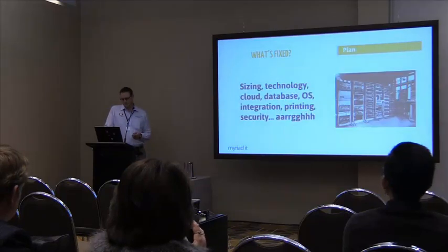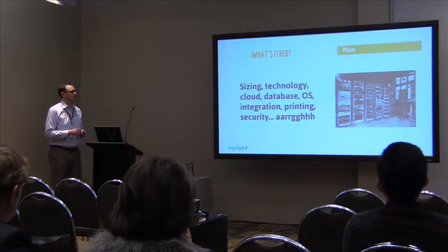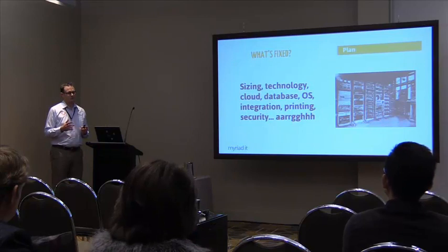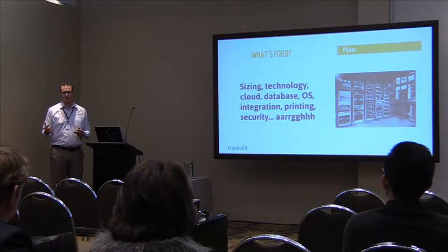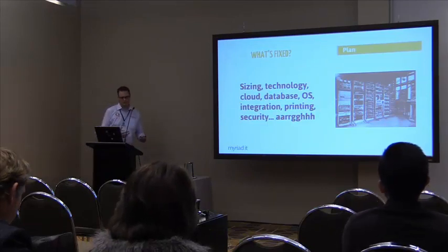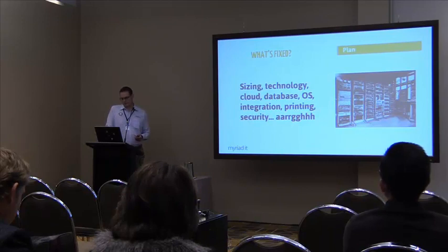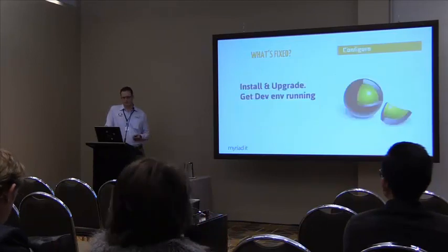Planning. When you start talking about planning, we're talking about what we're going to do in terms of changes. We're going to upgrade JDWs, but what else do we need to do? Am I upgrading my hardware? Am I going to upgrade my OSs? Do I need to bring any additional infrastructure in place? Any of those other changes linked in with the upgrade, what impact are they going to have? Based on prior experience, this is probably about 5 days of a solution architect coming in and going through all these bits and pieces, so then you can put that together in your plan.